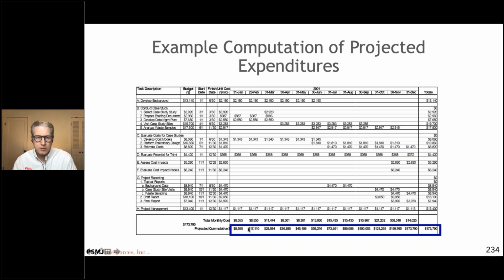$8,555 of cost, right? Our total monthly cost, or our planned value, should be $8,555. That makes sense, right? Isn't there going to be a little bit of rounding error up and down on each one of these where it just kind of works out in the wash a little bit? Yeah, I mean, definitely. I think that any phase of a project will have some kind of wiggle room one way or the other. You might spend more time in SD and then back and forth. I'm in complete agreement with you. So I think that's pretty good.